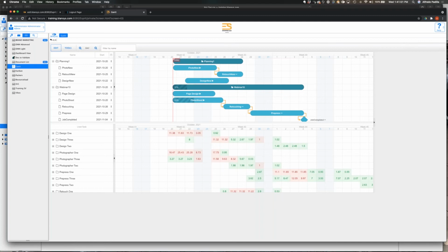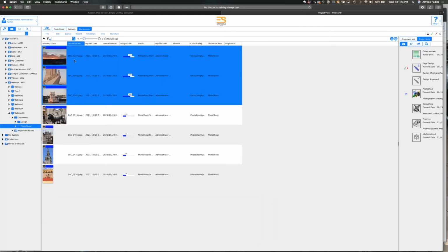So it's doing some files, it's completed. I know it's actually in progress, so I can take a look at that. If I'm popping in here as a CSR or a manager to see if this is getting worked on, I know the photographer's doing his work. He's already got some images shot. Now, what this 43% represents is 3 files out of the 8 are approved.